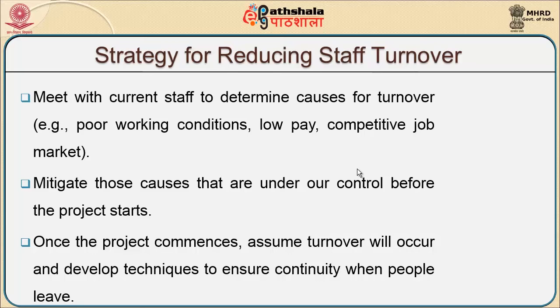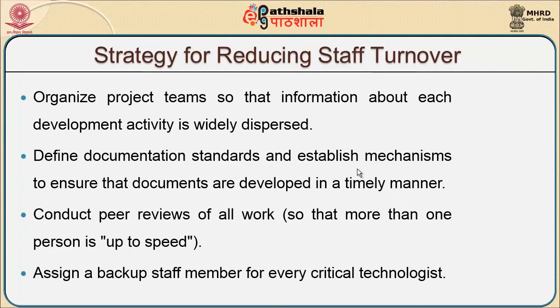Once the project commences, assume turnover will occur and develop techniques to ensure continuity when people leave. We may have to organize project teams so that information about each team development activity is widely dispersed. We are to define documentation standards and establish mechanisms primarily to ensure that documents are developed in a timely manner.